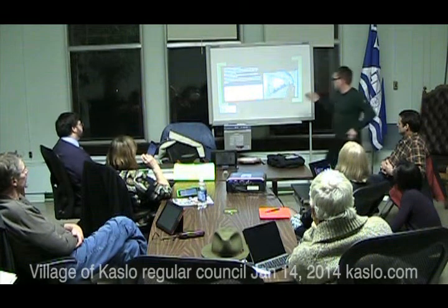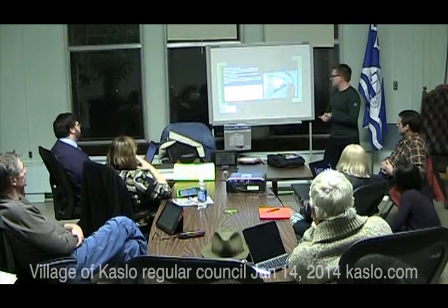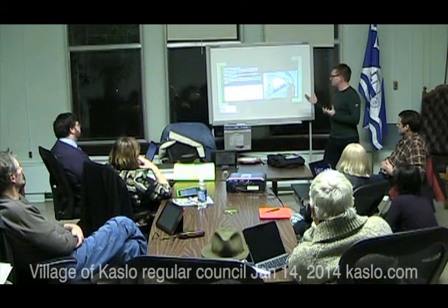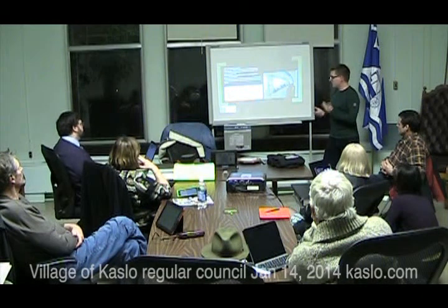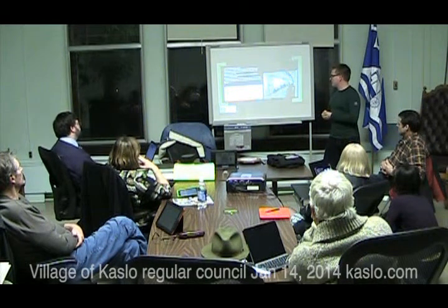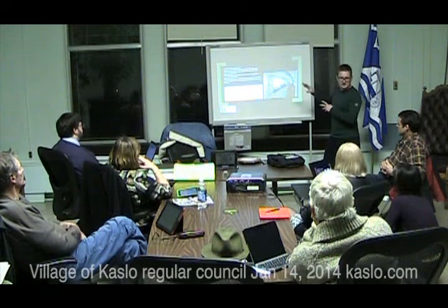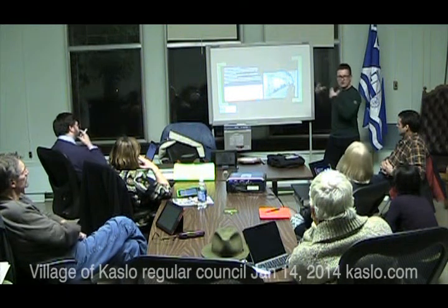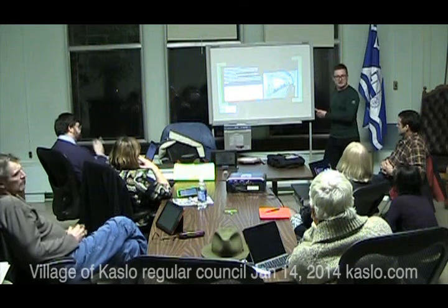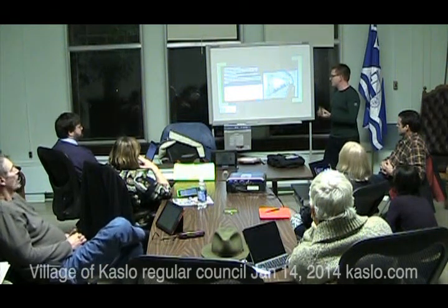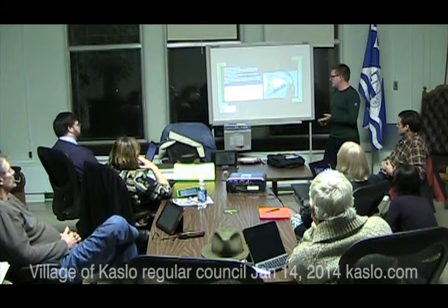I'll just break through this quickly, but we looked at budgetary pricing of about $200,000 for the equipment. We think it would fit in your existing room, maybe $30,000 to plumb. We've got quite high engineering fees because there's some uncertainties with these numbers. Typically, if we were going to go ahead with it, we would firm up the pricing. These are budgetary numbers, but we allocated $70,000 for the engineering, legal, and administrative costs.